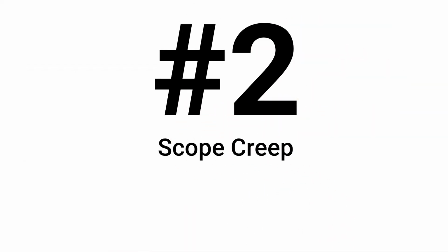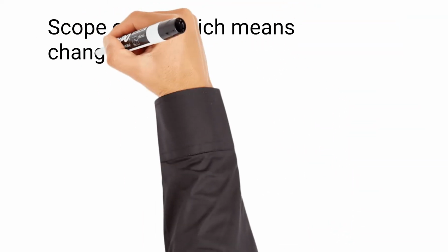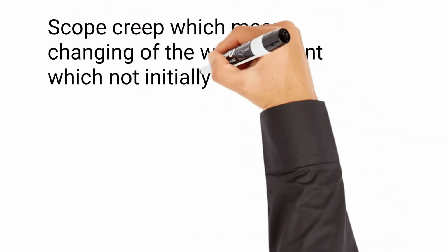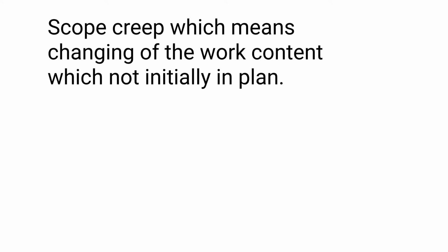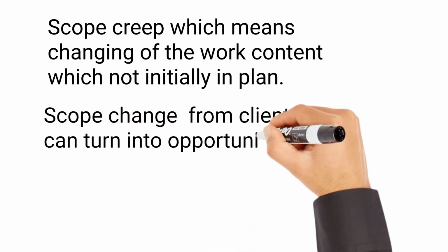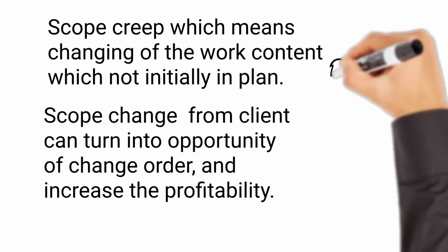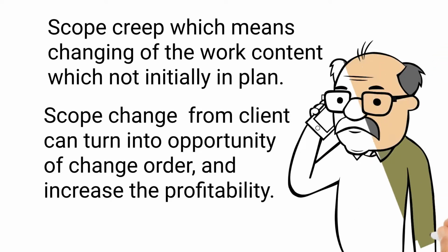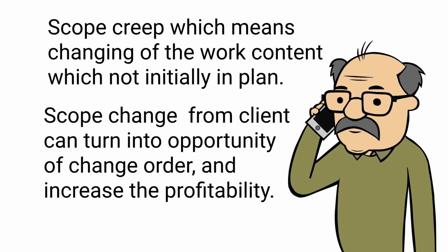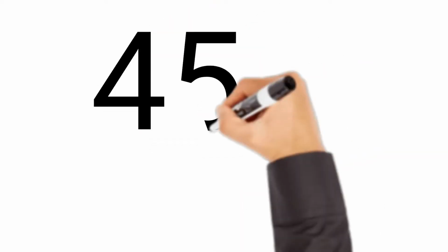Scope creep means changing the work content which was initially not in the plan. While the project is already in progress, adding new scope to the project is a risky endeavor. This can lead to delayed schedules and cost overruns in an uncontrolled manner. However, a scope change by the client can turn into an opportunity to claim a change order and increase profitability. With a dynamic business environment and frequently changing business needs, scope creep is often inevitable. However, the new scope should be handled carefully with proper planning.